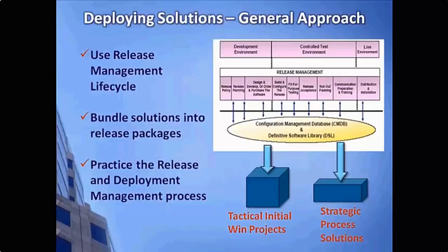Another example of a release is maybe we combine a change management, where maybe we call it version 1.2, that is now released with some basic process activities in place that just simply do simple change logging and reporting. As we release a version 2 of change management, we may have added more to that package, such as a change advisory board or CAB review and some processes and procedures around impact analysis. So again, you package these releases for deployment in whatever manner logically makes sense given what you're trying to do.